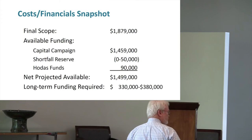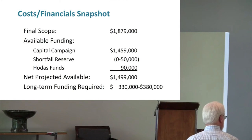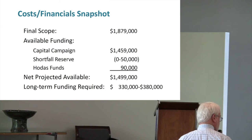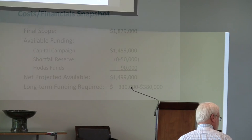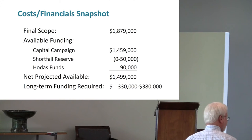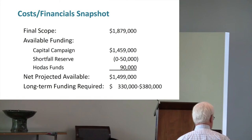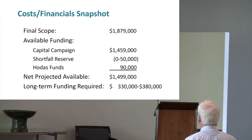Just to remind folks, the top number there, which is a firm number exclusive of a few small contingency items, is just below our $1,009,000 budget. And there are a couple of items too that McCarthy and Smith, who are our construction managers, are still beating some contractors over the head on, so we hope we can take that down a little bit.